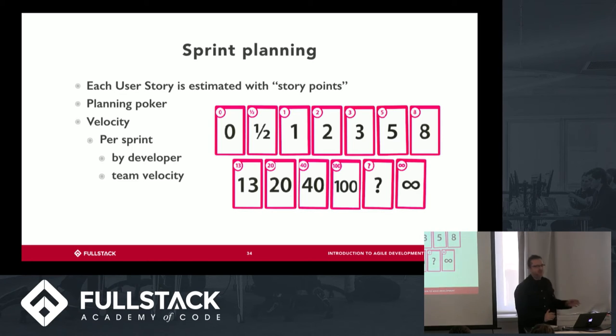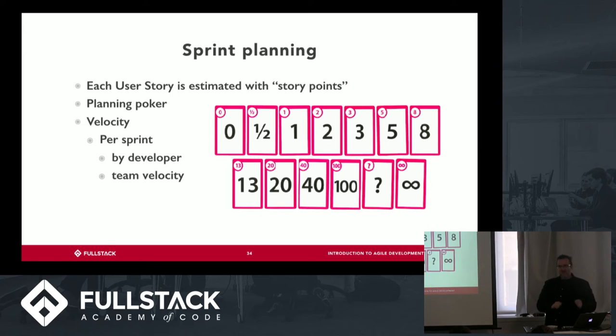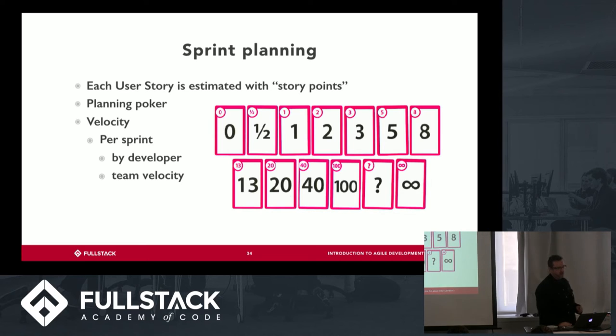But let's say, for simple math, that one story point is equal to 1 hour. And let's say that you are working on the engineering team full-time, 40 hours a week, then your velocity as an engineer is 40 points per week. Let's say there's five of you engineers on the team. You're all working full-time, so your team's velocity is 200 story points per week. Let's say it's a two-week sprint, so you've got 400 story points to work with. So the Scrum Master will look at that and say, all right, I've got an available 400 points of engineering time, prioritize my backlog, I know how much each ticket takes, and then that's the sprint we're going to do. And then the velocity will get tracked through something called a burndown chart, which we'll look at in a second. But that's basically how velocity works.